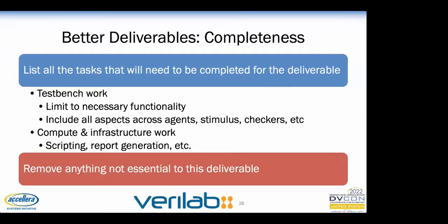Now that we know what done means for each deliverable, we need to come up with the work that we'll have to do in order to demonstrate our deliverable. At this point, we want to get a list of things that we'll have to do in order to satisfy our definition of done. If this is the first pass in the defining phase, we may need to keep this to a high level to be refined later.